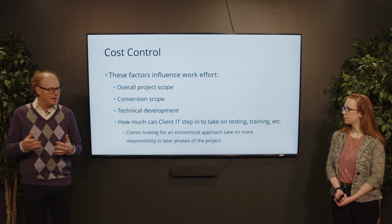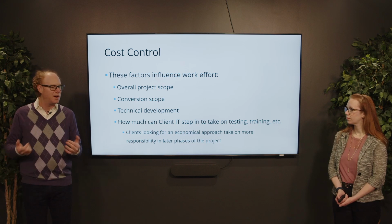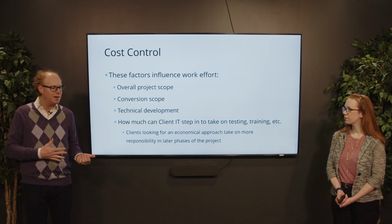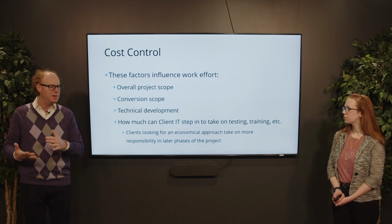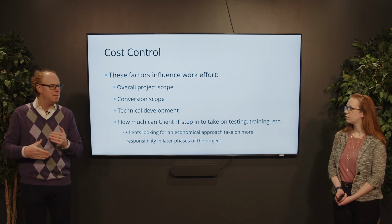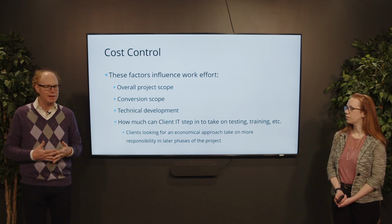The one thing that we can make some choices around is the amount of transactional data and our transactional cutover approach. Are we trying to bring years of submodule history up to Infor CloudSuite and transform that to fit new structures? Or are we taking a clean approach, maybe running out older transactions in the legacy system and just beginning with new transactions in CloudSuite?